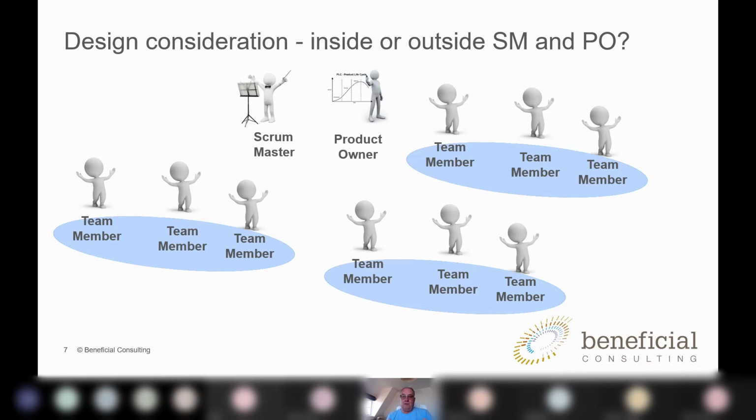But if you've got a team that's 2 or 3, 4 sprints in, then that Scrum Master role would be back down to 3 days in 15, and therefore you can start to think about, okay, is this an effective use of Scrum Master, or do you take the safe approach and make a Scrum Master across 3 or 4 teams, or 2 or 3 teams rather, or do you need to construct it differently?